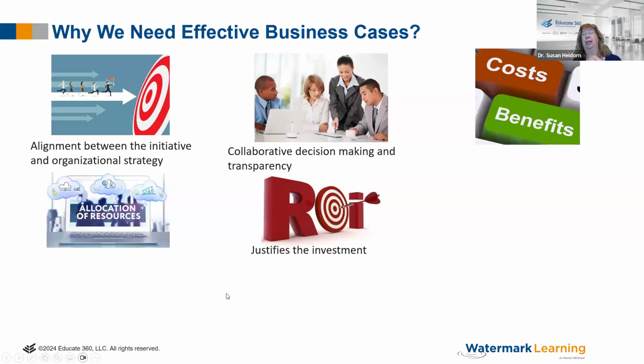The other thing is return on investment. Will we get a return? What is the payback period? Is it 2 years? Is it 40 years? Is 40 years appropriate? Are we going to buy that? I don't know. Things change so fast. Anything for 40 years would be long gone, but it justifies investment. Yes, this makes sense for all the resources and the work we have to do, but the value we're going to get is going to be more. So it justifies the investment. It feeds into your portfolio management to justify that.